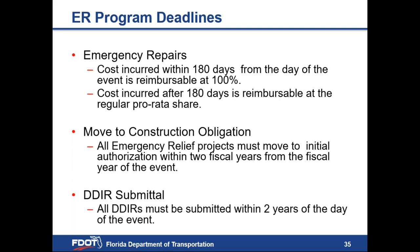One of the best practices we've implemented in District 5 is including key dates in event notification emails. For your emergency repairs, costs incurred within the first 180 days from the day of the event are reimbursable at 100%. Costs incurred after 180 days are reimbursable at the regular pro rata share. All ER projects must move to initial authorization within two fiscal years from the fiscal year of the event. DDIRs must be submitted within two years of the day of the event.